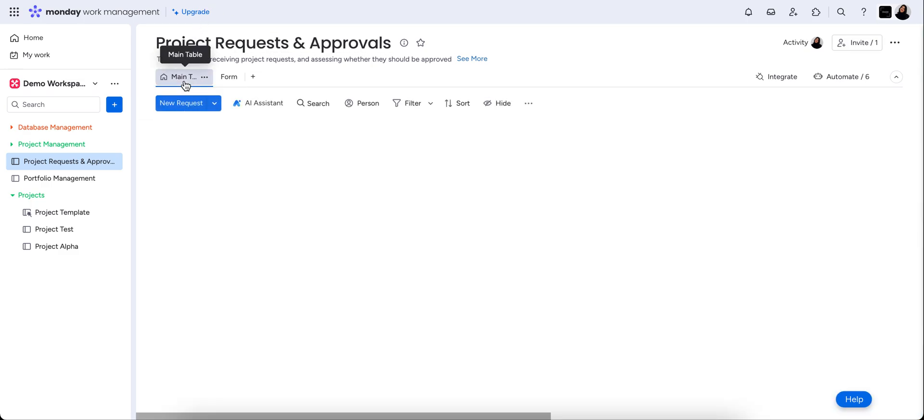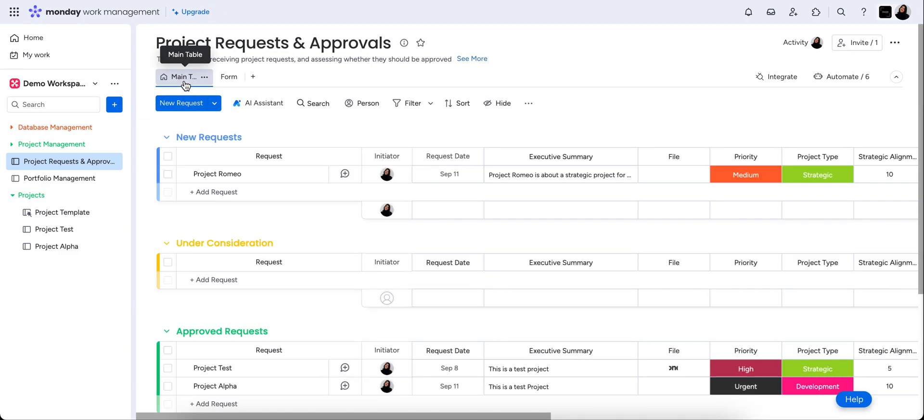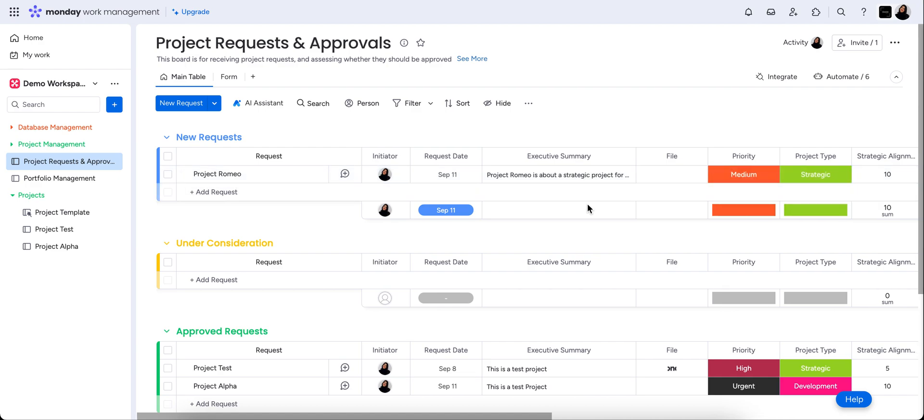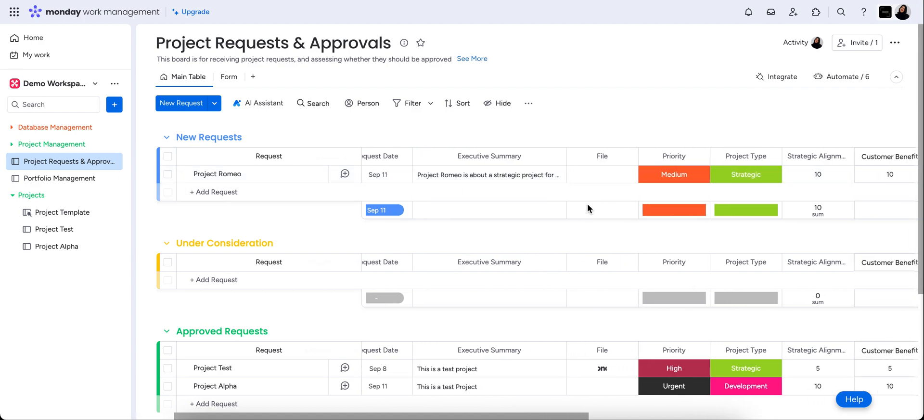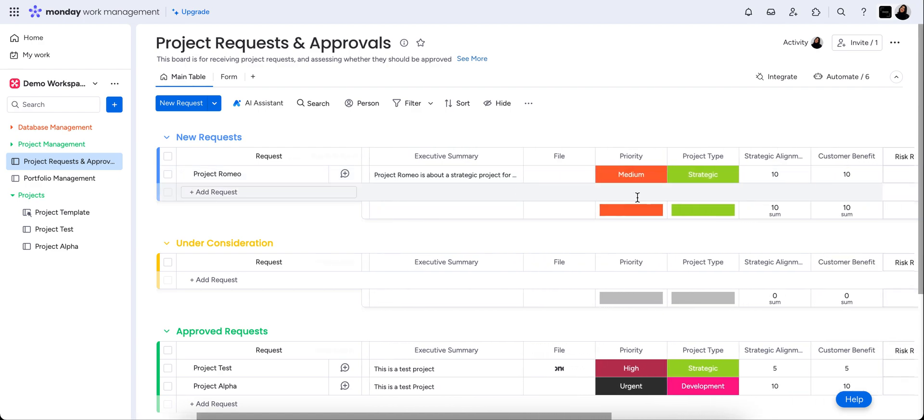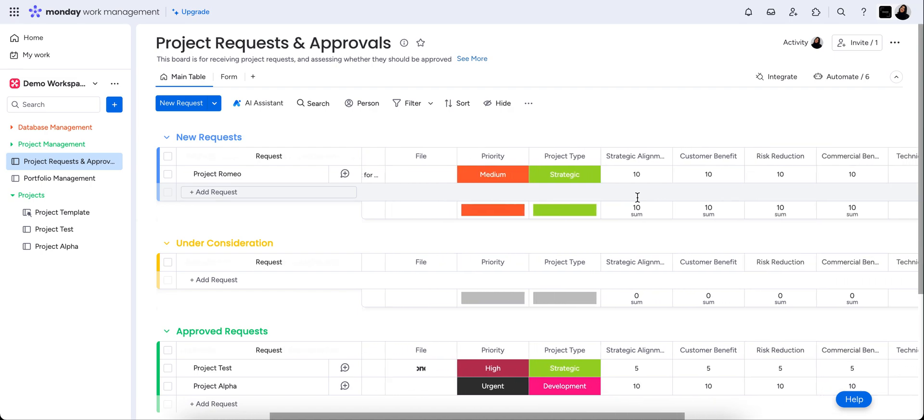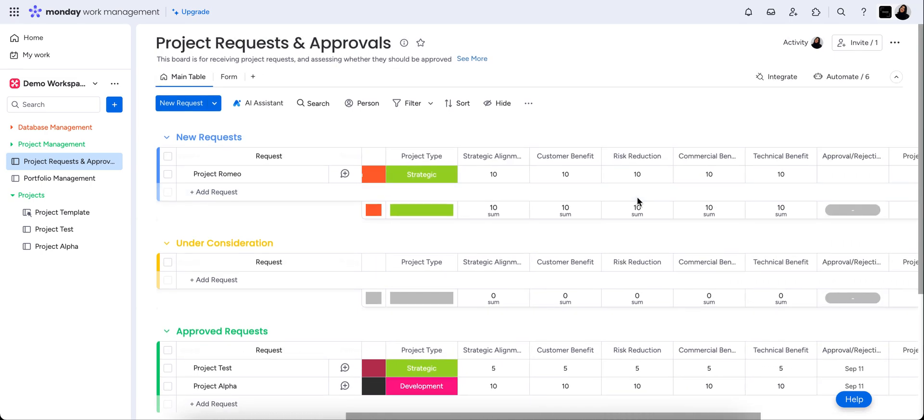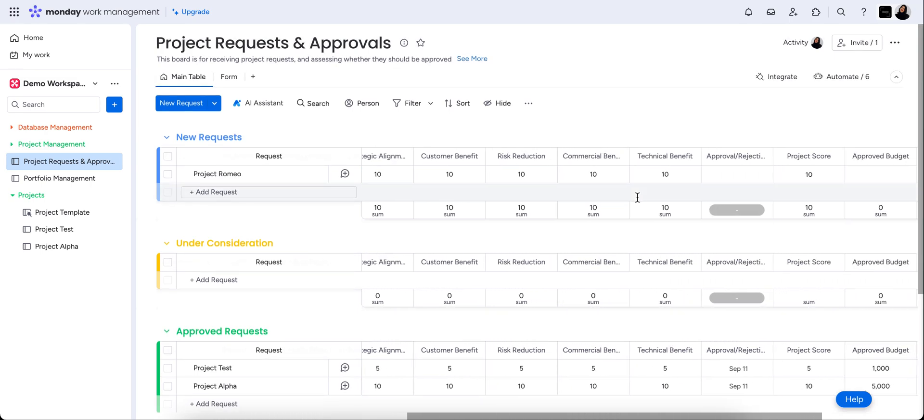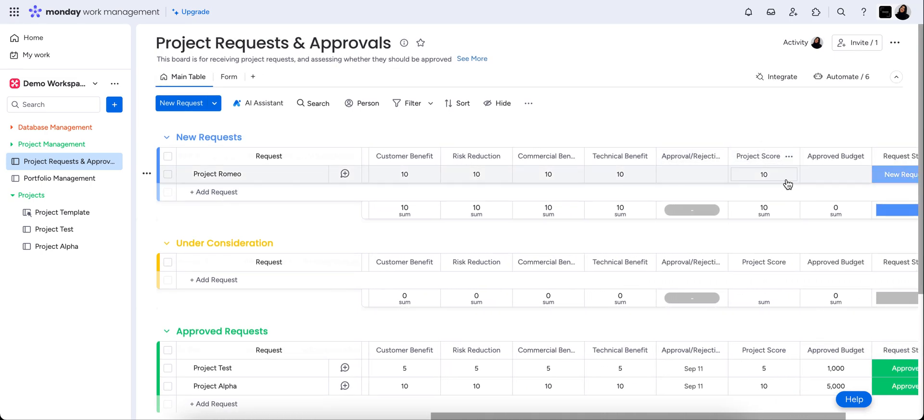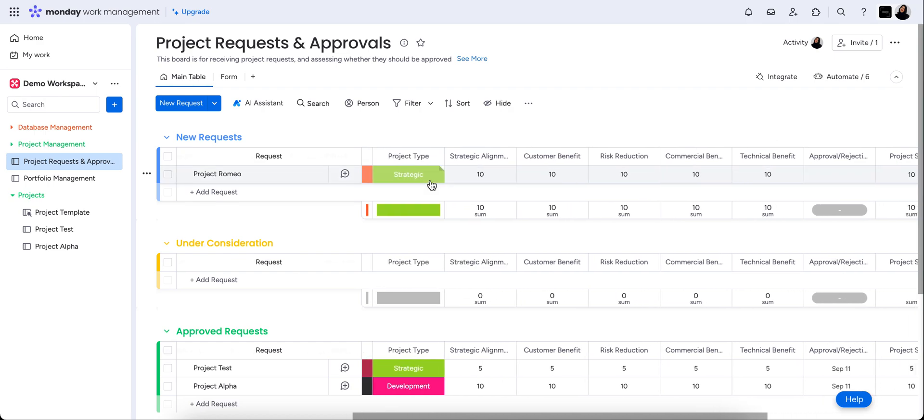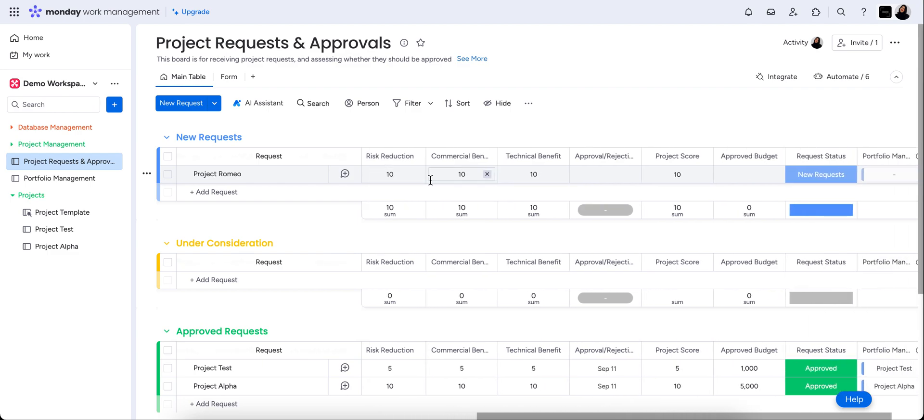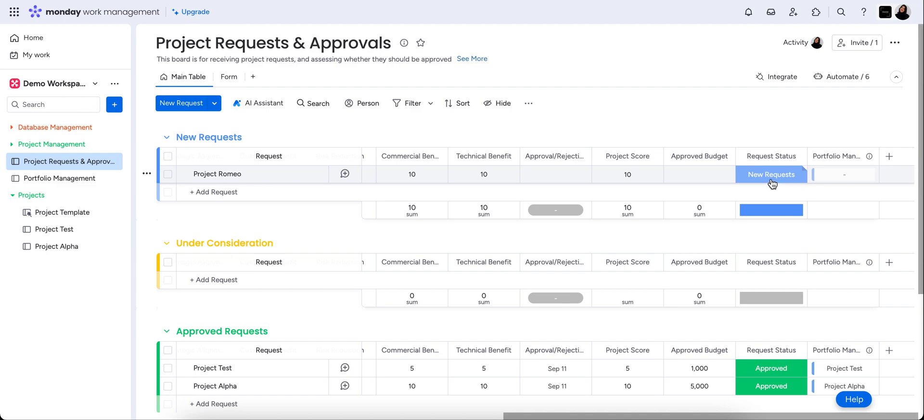Form has been submitted. And we can see here on the main table that it has automatically come through to our new requests. Now, all the information that we put into that form is here. And you can see that we have a project score, which is basically a formula column, which takes the average of all of these columns.